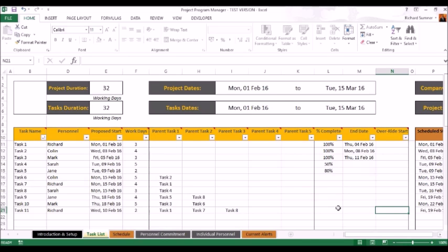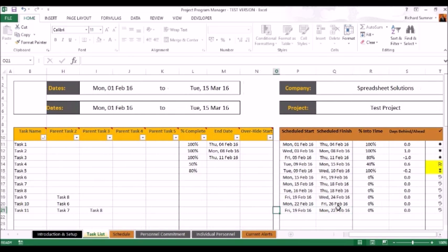But let's just say, for argument's sake, you get to the 17th of Feb and you realize we can actually start now because it didn't have to finish task 8, and we're going to override all dates and start on the 17th of Feb. In this override start date, we can put in the 17th of Feb, and that will change the start date to a definite date on the 17th. So you've got the override option. Otherwise it'll track the other dates and put in the date when it can actually start.